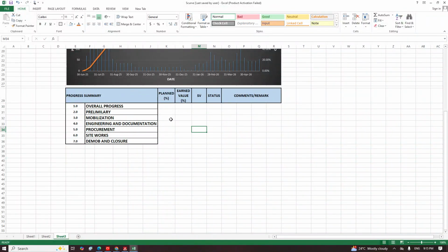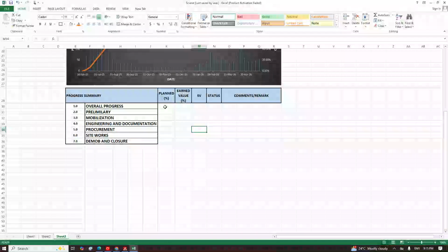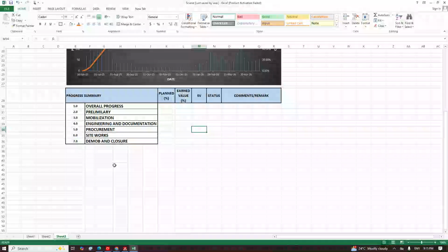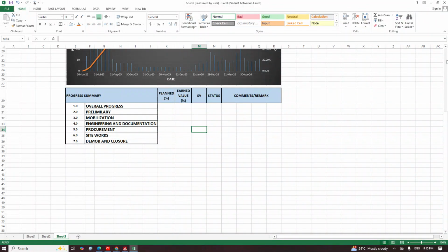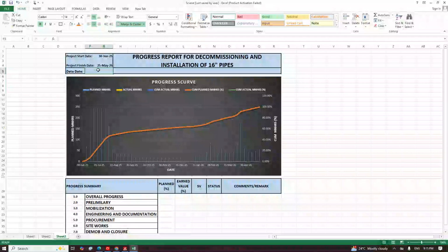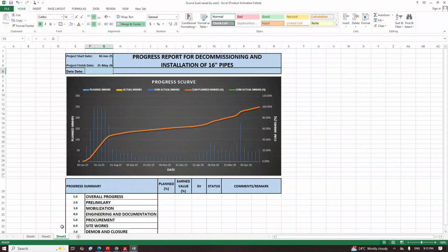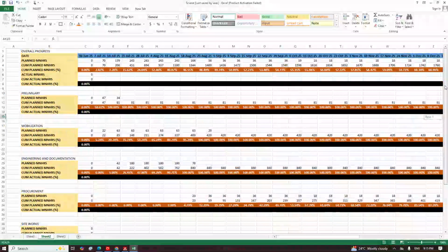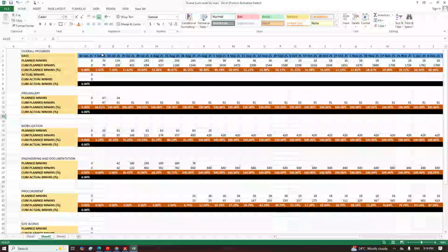So now, this is where the business, the game started. This is where we have the main key now. Each time I update, I just want to be able to see my value automatically just by changing the date. So I'll come here, I'll put a date. All the dates you'll be putting, please take note: you must make sure the date is in line with these dates: 7, 14, 21. So I'll take 7. I want to test run it.